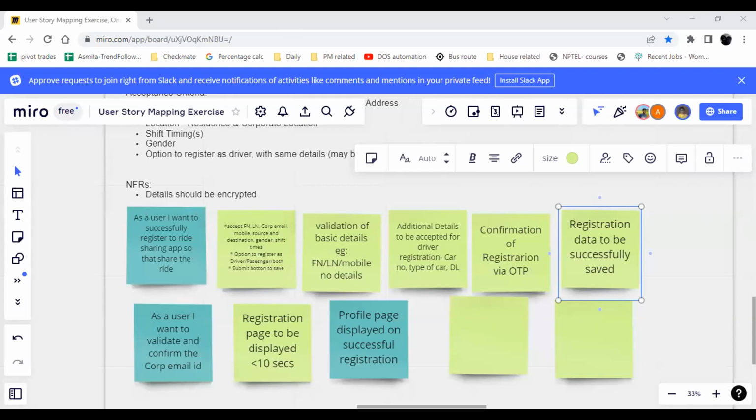And the best place to add all the technical specifications as technical requirements is tasks, right? We will be adding tasks under each of the user stories. There the developers will decide on how they can technically implement this feature. Exactly. So a user story only talks about how the business wants this feature to be seen, right?